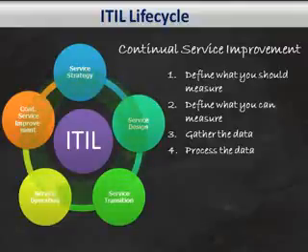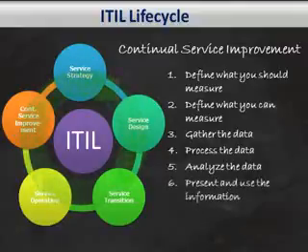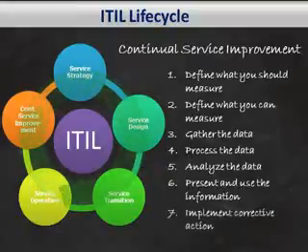5. Analyze the data. What are its relations, its trends? Is it according to the plan? Are we meeting targets? Do we need a corrective action? 6. Present and use the information, either assessments and summaries and action plans, etc. 7. Implement corrective action.